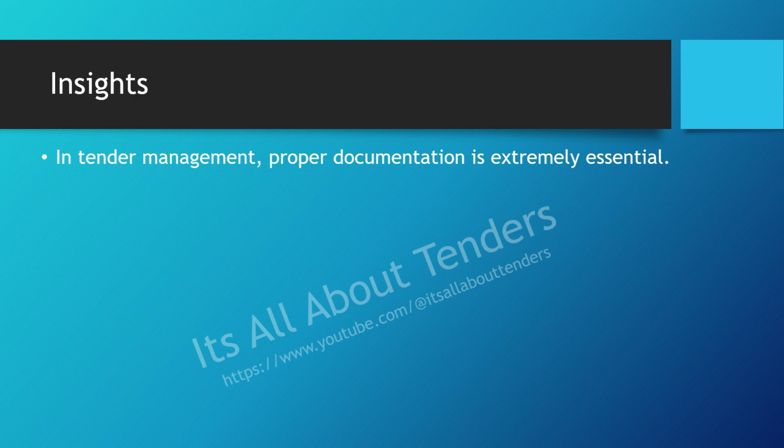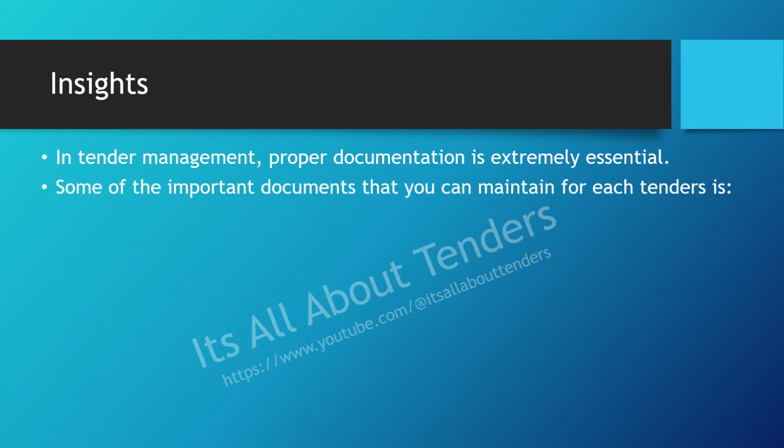Some of the important documents that you can maintain for each tender: a proper folder for each tender. I have a habit of preparing folders for each tender, with an inquiry folder in it where all the inquiry documents, the corrigendums, the RFPs, ITBs, and SCCs are placed. The second is a submission folder, which I prepare to submit the documents. The third is a queries folder: after submission, if there are any queries received from the client, I have a queries folder where all the queries and the documentation for them are kept.